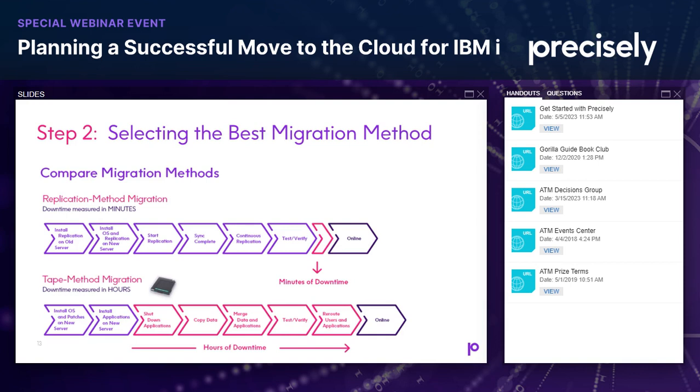You can see the difference in the downtime because with migration utilizing a logical replication solution, you can do all of this stuff up front. You can do all your setup of your replication to the new target system. You can do testing on that new target system during the day when most IT people would like to work rather than off hours, holidays, weekends. You can do unlimited testing. You can test once, twice, 3 times. You can bring in certain users. You can do whatever you want with the comprehensive test plan and not affect any downtime to the users.